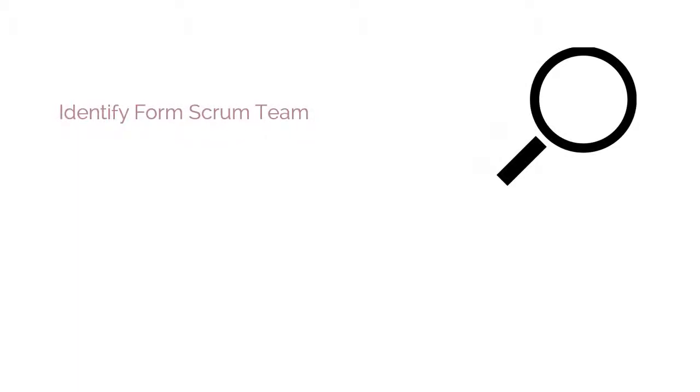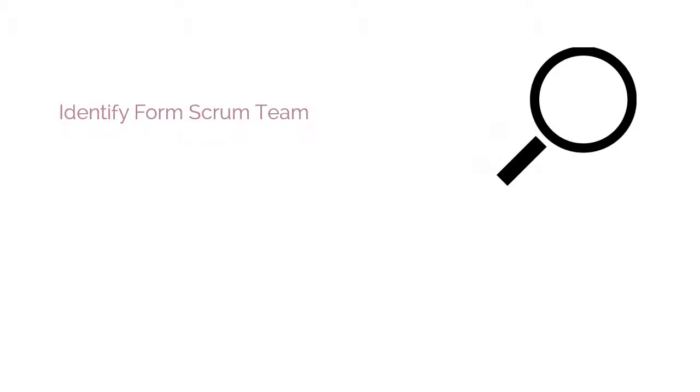The third process is the Form Scrum Team process. In this process, Scrum Team members are identified. Normally, the product owner has the primary responsibility of selecting team members, but often does so in collaboration with the Scrum Master.